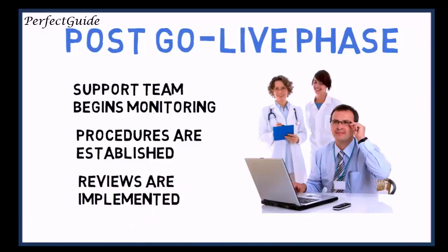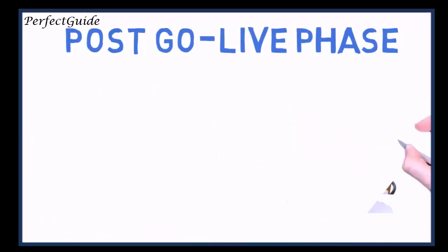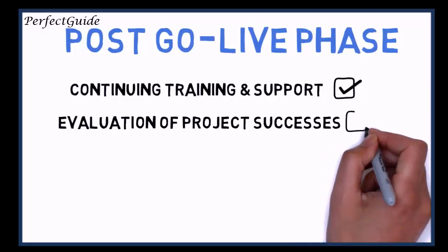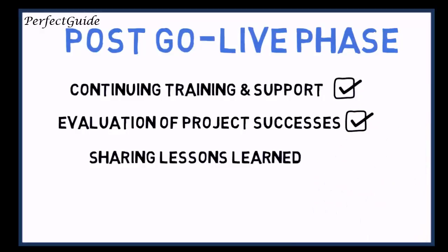Milestones and important activities of this phase include continuing go-live training and support, formal evaluation of project successes, identifying and sharing lessons learned, and documentation and management of enhancements requests.